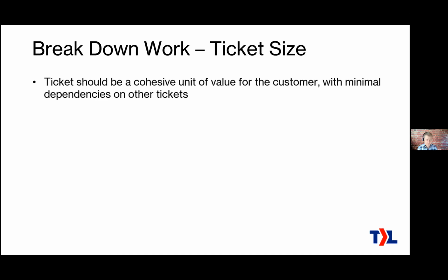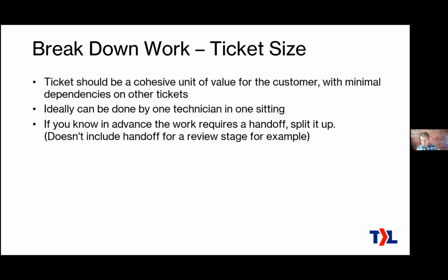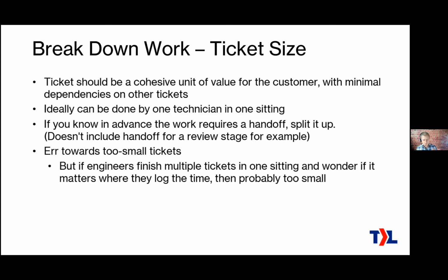When in doubt, err on the side of too small tickets. I see people making tickets that are too big rather than too small, although certainly that has happened. One thing that you might look at to know I've made my tickets too small is if the engineer sits down and they have a couple hours to work, and instead of working through one ticket, they knock out like 6 different tickets.